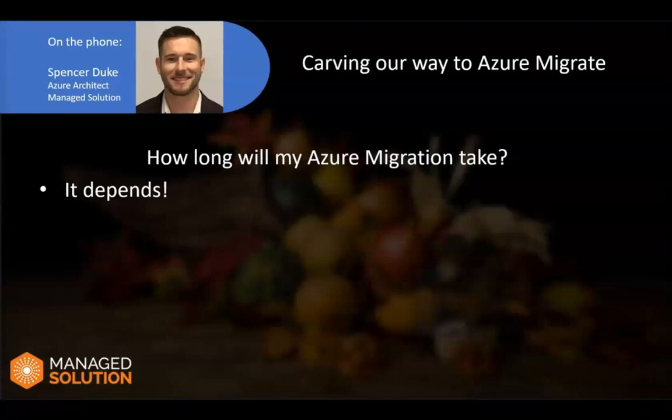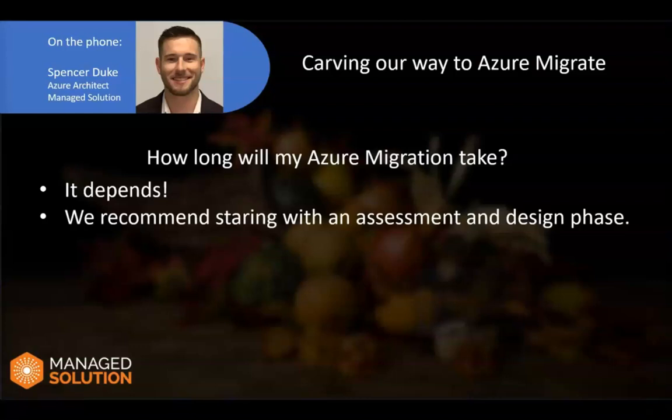With our projects, I'll break it down this way. We always start with an assessment and discovery phase. We then move to a planning and pilot stage. We develop what we believe to be the appropriate plan from a technical standpoint, and then plan that out with the customer to see how that works from the business's perspective. We come to a consensus on what we think the plan should be in terms of downtime and scheduling and things like that. And then we start building the infrastructure, typically in the background. And then we have the actual implementation phase where we start cutting over resources.